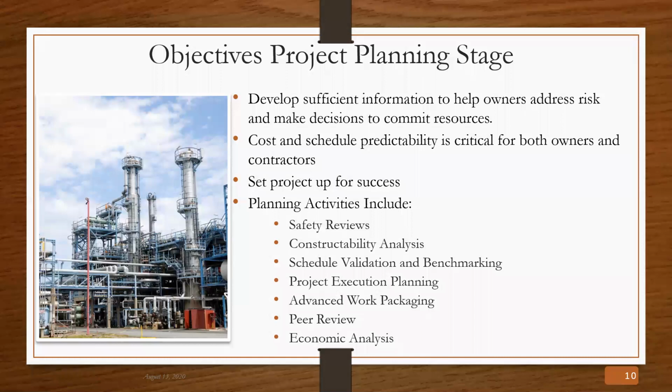constructability analysis, which we are going to talk about some more in the next slide, schedule validation and benchmarking. You basically look at the schedule that you are publicizing, that you are promising your joint venture partners, your clients, and your shareholders, and be sure that you are able to meet that by validating the schedule and also benchmarking against similar projects that have already been executed.